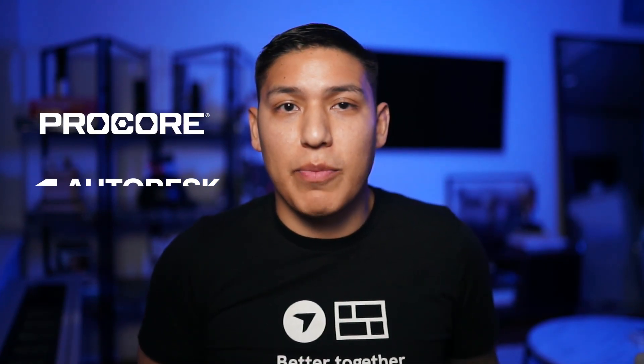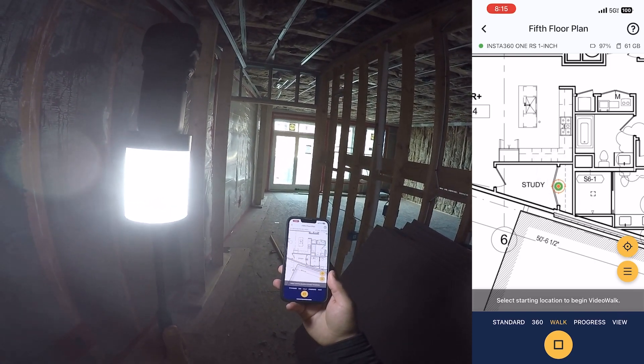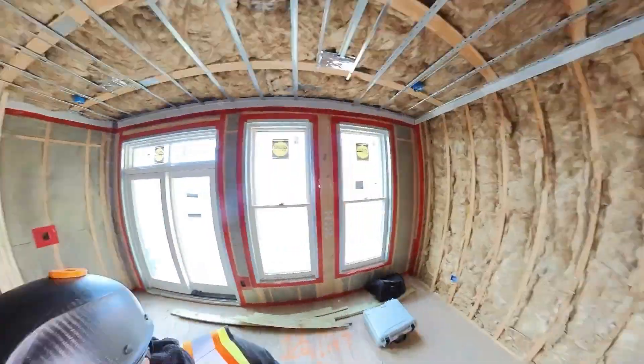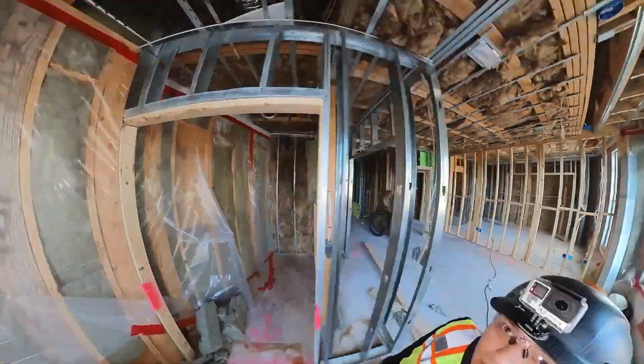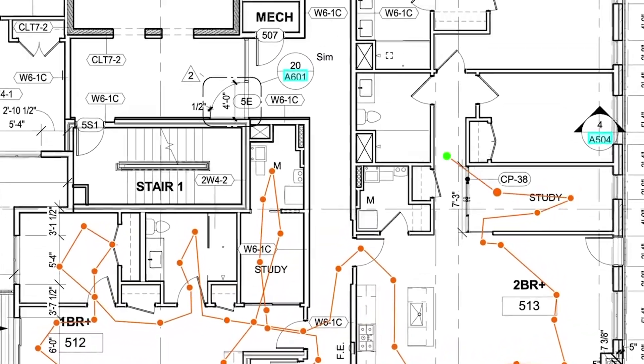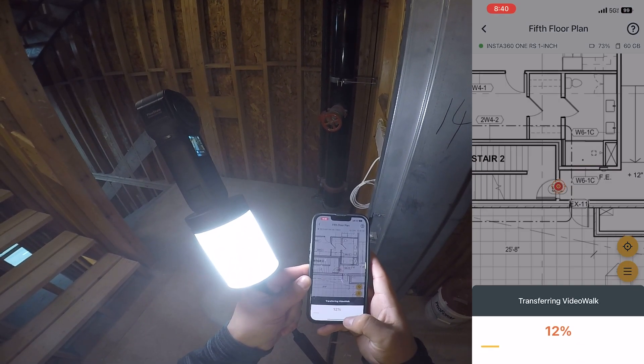How does it work? To use the product, simply sync your drawings from Procore, Autodesk, or one of the many project management softwares we integrate with. Then connect the 360 camera to your phone via hotspot — you don't need cell service — and mark your starting location in the app. As you walk, the camera will automatically take two photos per second and our software will start understanding where you've walked on those floor plans. Then you mark an ending location and all the processing happens in the cloud with no extra work done by you in the office later on.